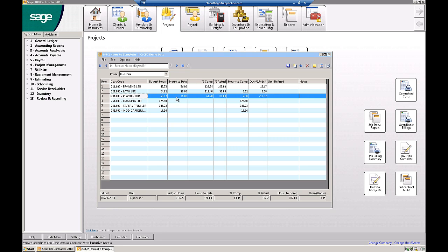So far through your payroll system, you charge that job and that item 36 hours. This means you've used 61%. That's just the 36 divided by the 58 hours the system is showing. Then you ask your guy in the field, hey, how are we doing on that job? And he goes, boss, we're not doing so good. We're only 45% complete on the quantities.